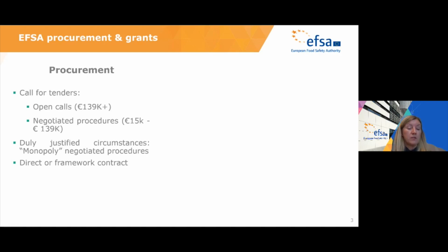Those are not subject to publication in the EU official journal. Instead, the opportunity to participate in these negotiated procedures is advertised on the EFSA website. And if you express an interest in participating, then you will be directly invited once the specifications are ready, and you will be invited to submit an offer for that.